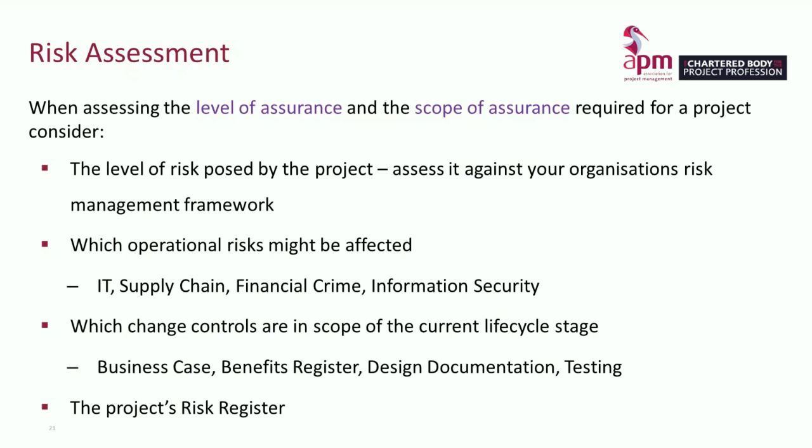And we should look at which change controls are in scope of the current lifecycle stage. Are you in the early phases where we might want to look at the benefits case, or the benefits register, or the business case? Are you in the design phase where we may want to look at design documentation? Or are you nearer to implementation where we might want to look at the testing performed? And finally, the project's risk register itself. Obviously, the project teams and the subject matter experts feeding into the project will be raising and managing risk as they proceed, so that is a useful source of information.